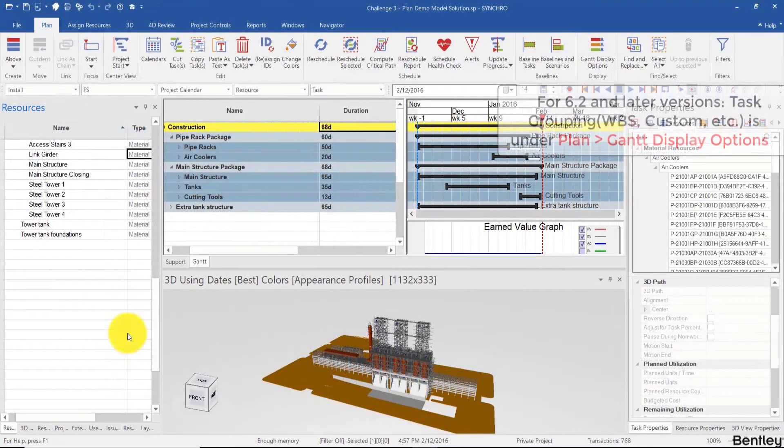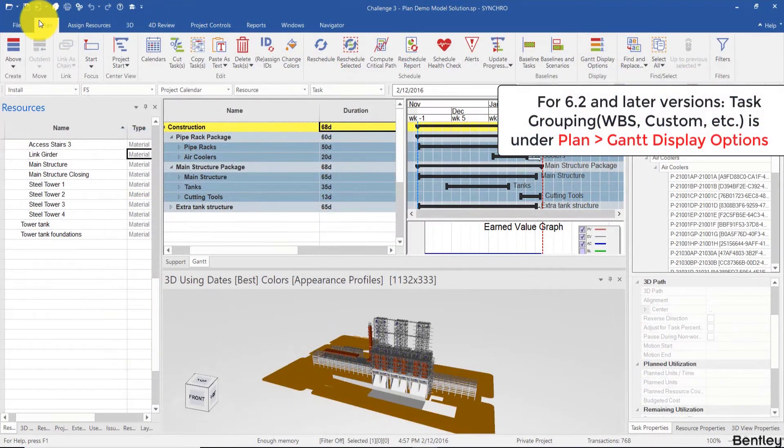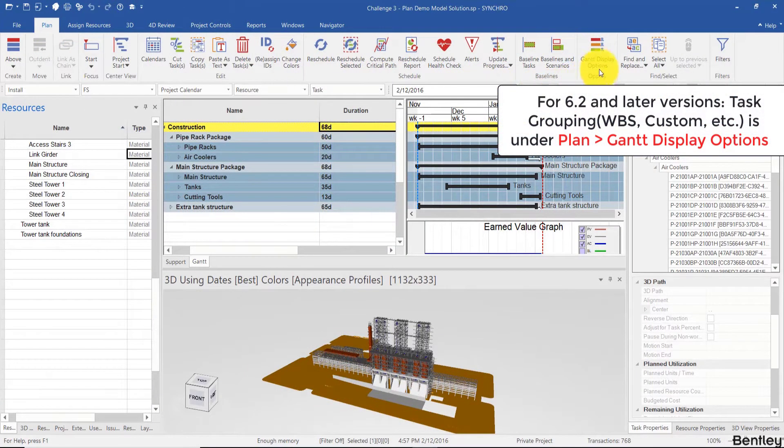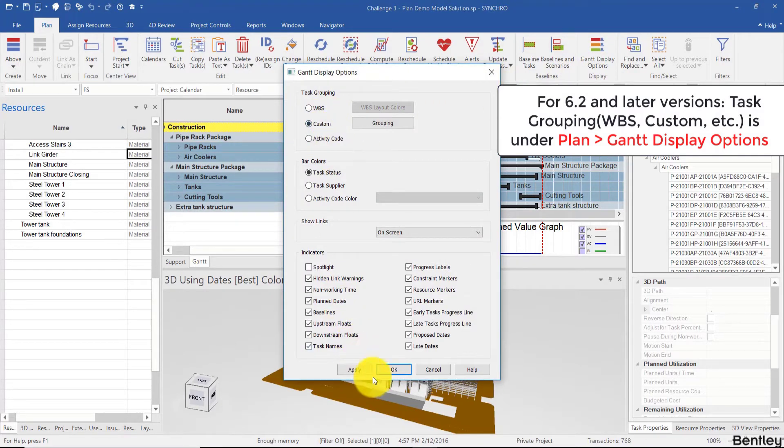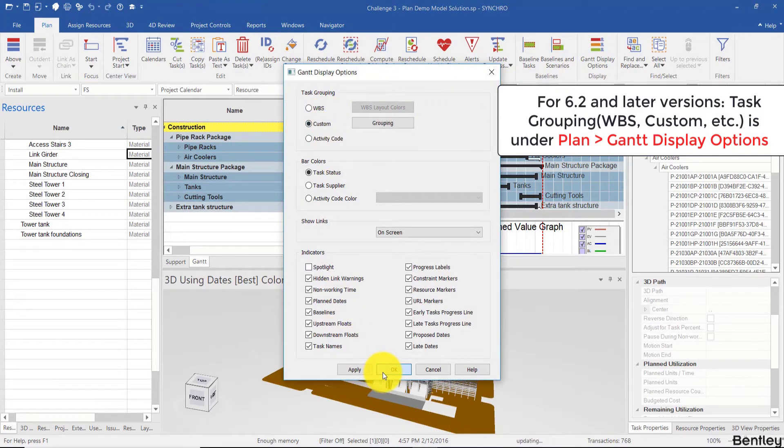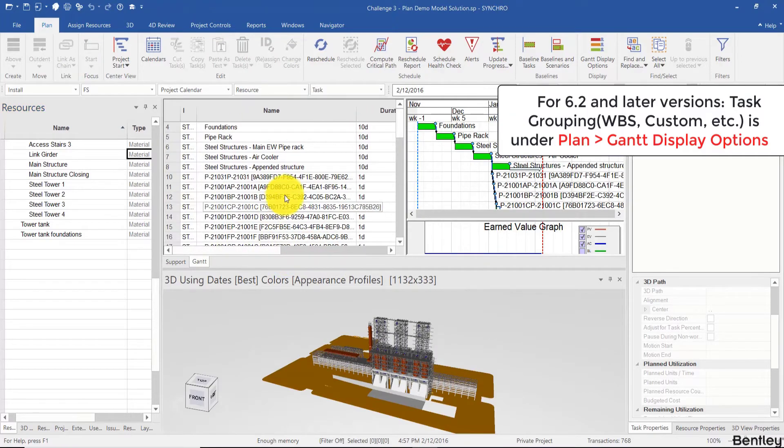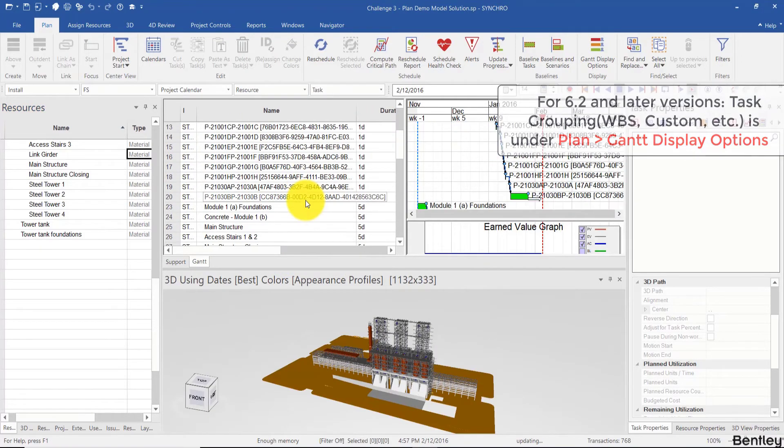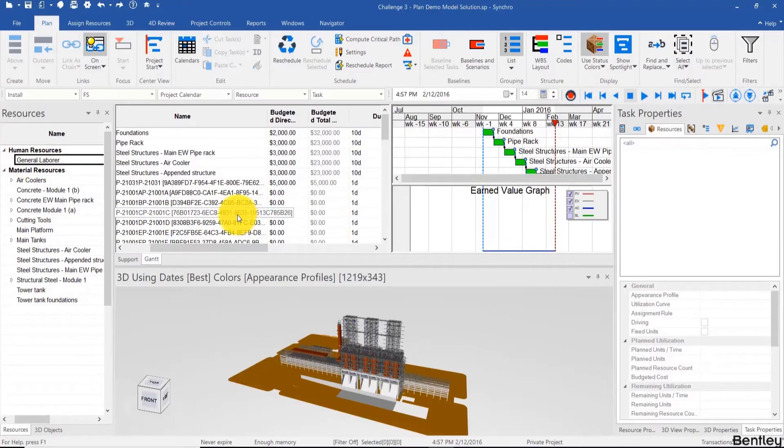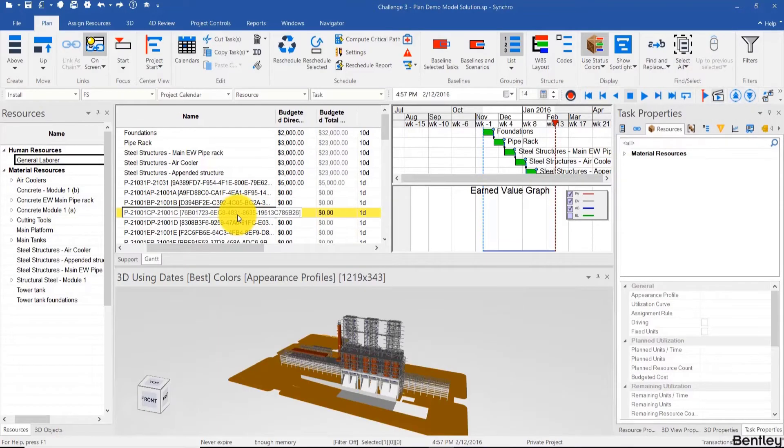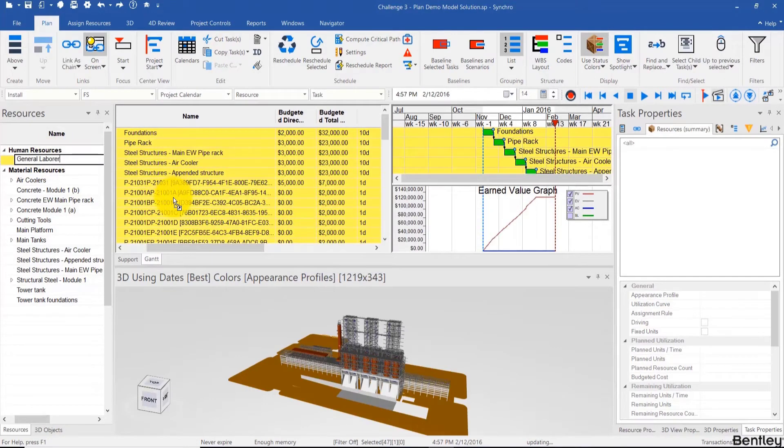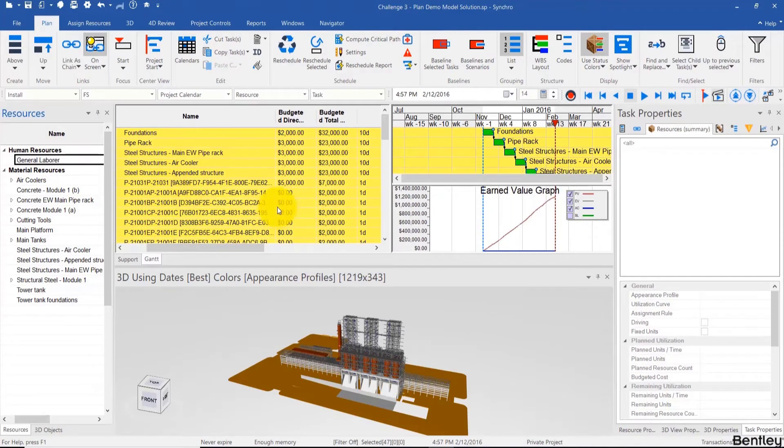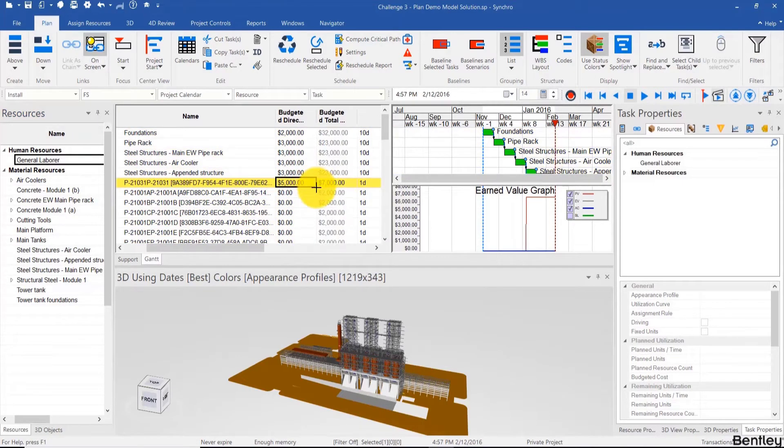I'm not going to do that, so in order to avoid that, a good idea is to go to list mode, add a lot of costs, and then go back to WBS mode. So I'm going to add the general laborer to all of the tasks, and also I'm going to fill down some of these costs over here.